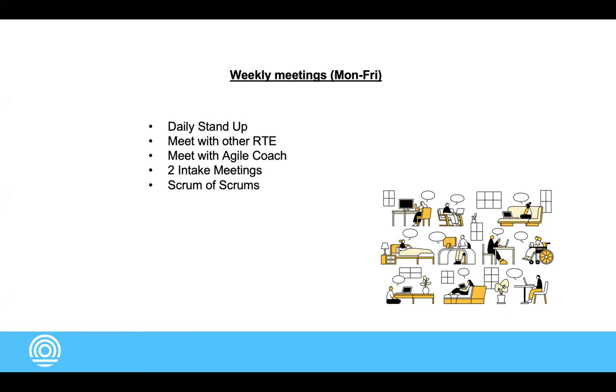We also have 2 intake meetings. In these meetings we go through each of our, we call them MSPIs, but essentially these are epics, to see what's ready to be worked on, or what's no go. It's usually a go/no-go process. And last but not least, I have a scrum of scrums with all of my Scrum Masters, just to see if there are any impediments, any type of bottlenecks or roadblocks that I can remove on the team to team level. So those are the majority of the meetings I have on a weekly basis, but of course there are other meetings that occur on a one-off basis.